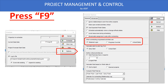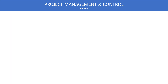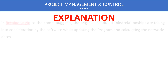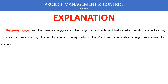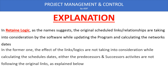Be careful when defining the program at the initial stage. Retain Logic means it retains the logic defined in the baseline program. When updating the program, these logic relationships are respected in future updates to determine network calculations and network dates.